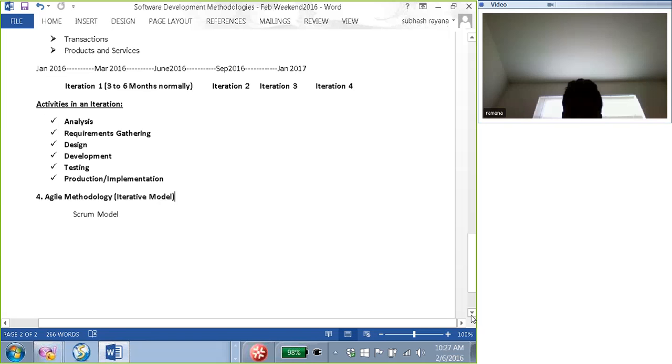The business has to be in the loop with what is happening frequently, right? So in order to communicate the status of the projects to the business, weekly or bi-weekly meetings are conducted, depending on the agreement, and these meetings are called PMO meetings. PMO stands for Project Management Office.